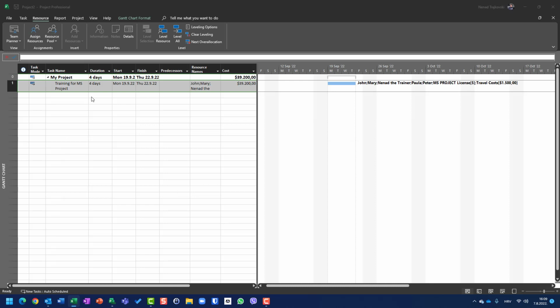Okay, now, what is fixed cost? Let's say that for the whole training, I have arranged with a restaurant or catering, which will say, we are based on all you can eat, but you have to pay for 4 days, no matter how many meals you have, a fixed price, which will be $5,000.